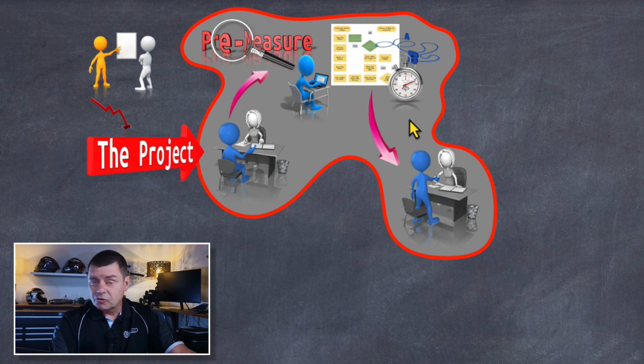And the second part of it is getting agreement around the plan from beginning to end. And it's this operating agreement that sets you up to get momentum. The number one complaint over the years has always been getting time and people, right? People just don't seem to get that. And what I point out to people is, if you didn't get agreement around the plan and when you needed people and how long you needed them for at the beginning, then all you ever had agreement on was the problem or the project, not the plan for executing that project. So we set up this operating agreement in the third phase, and then we move into the project proper.